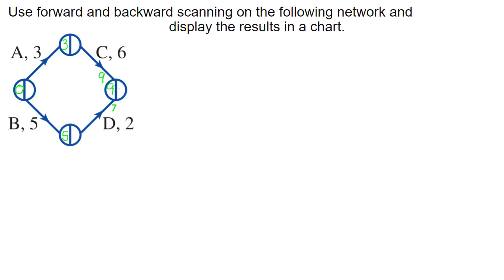That's forward scanning done. These are the earliest start times: the earliest I can start A and B is zero; the earliest I can start C is at minute three; the earliest I can start D is at minute five; and the entire project can be completed after minute nine. Now we can do our backward scanning.